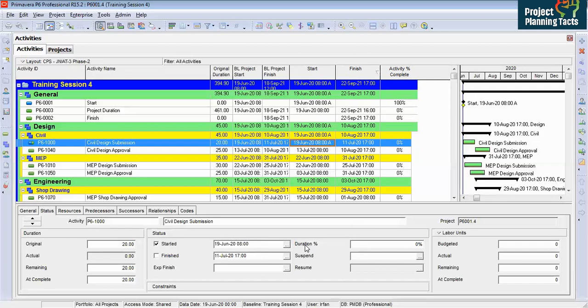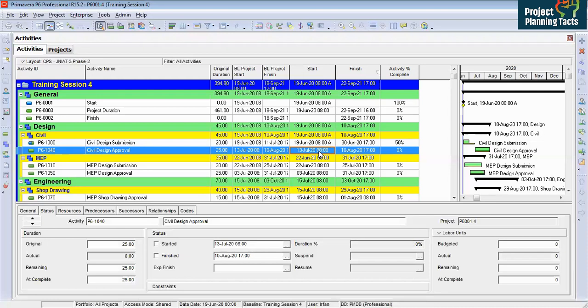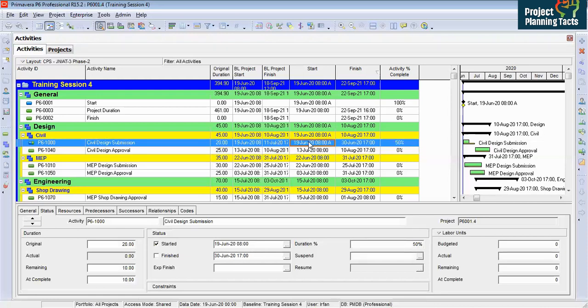So here it is showing duration percent complete. I would say here 50, enter. So it is showing 50%. Okay. And then approval. Now I started this activity, it means we have submitted 2 documents. Automatically the approval activity is started. The approval activity starts the next day of the submission. So I submitted my 2 documents, which is 50%, on 19 June.